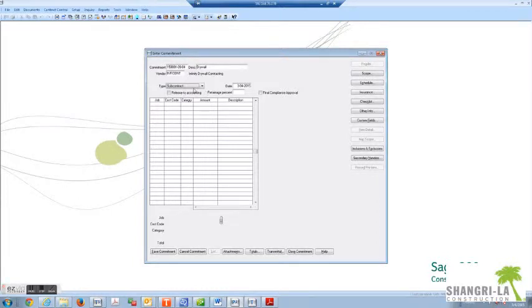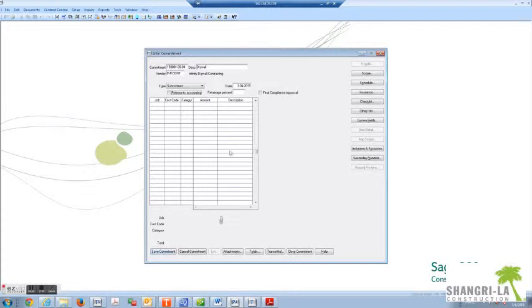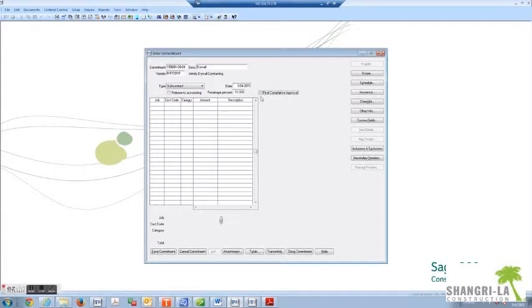Tab over, enter the date. Release to accounting - you can leave this open, it automatically fills once you save the commitment. Enter as a default 10% retainage. This can be negotiated. It's very rare but we want 10%.